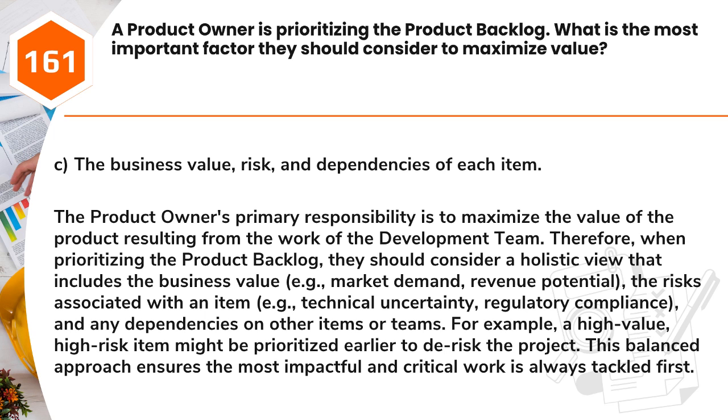or teams. For example, a high-value, high-risk item might be prioritized earlier to de-risk the project. This balanced approach ensures the most impactful and critical work is always tackled first.